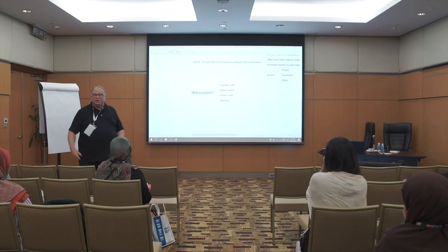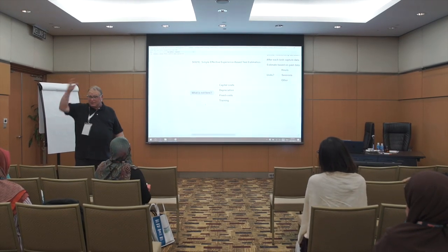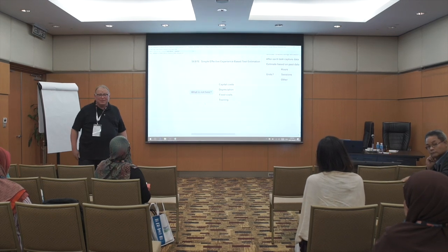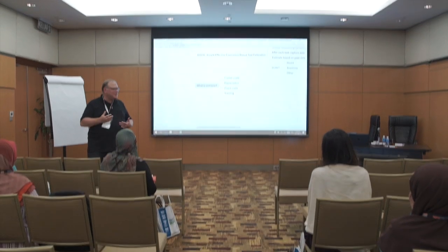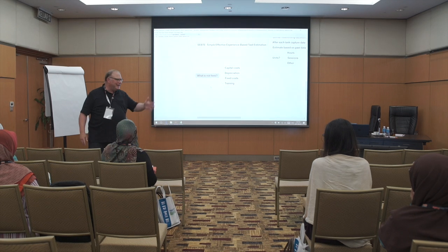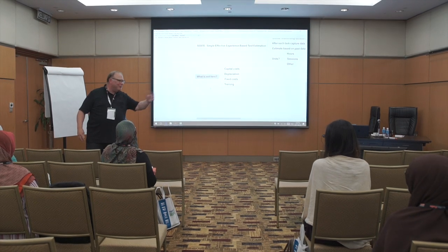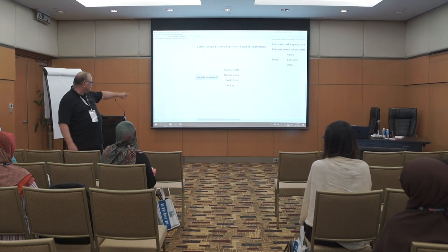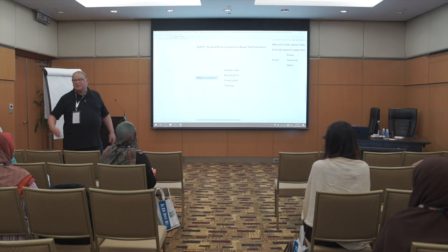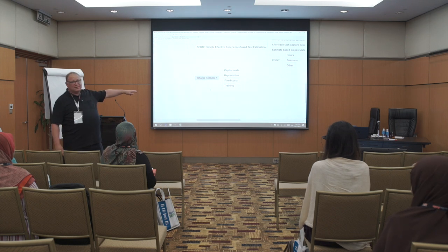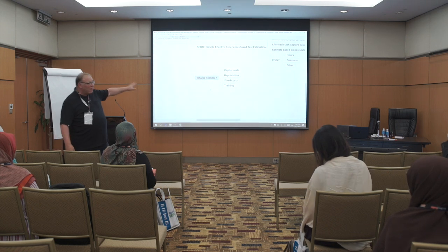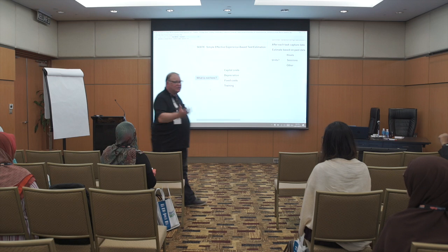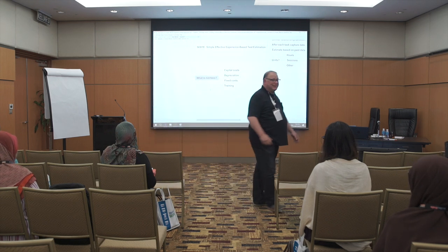It doesn't include depreciation costs or accounting costs. By the way, I like to use sessions because you can't trick a session. If you say days, you might work 8 hours, 12 hours a day. So you have to pick your units carefully. It doesn't include fixed costs, contractors, or training costs. There are many factors not in the estimate, but it is a good estimate for the actual work breakdown.